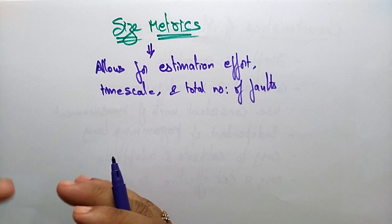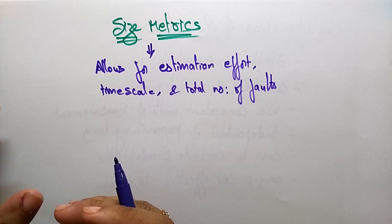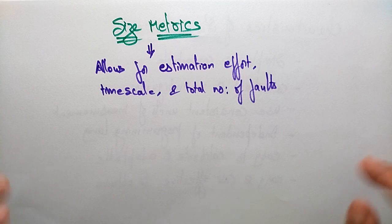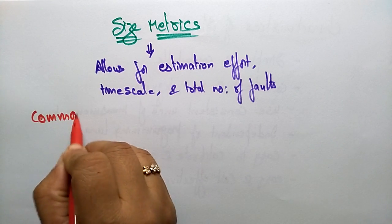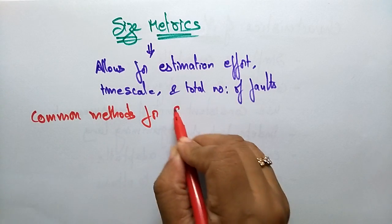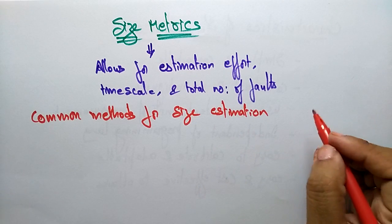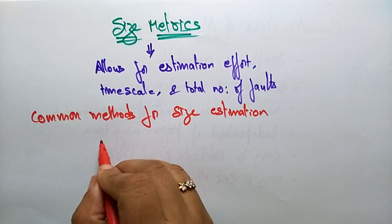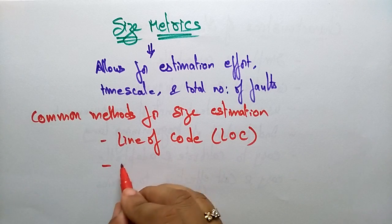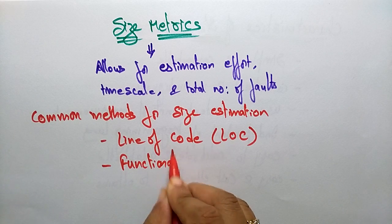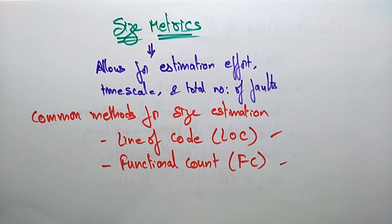Estimation of size is a critical and difficult area of project planning when compared to others. There are some common methods for size estimation of a process or a product. The two common methods are: Line of Code, that is LOC, and Functional Count, that is FC.